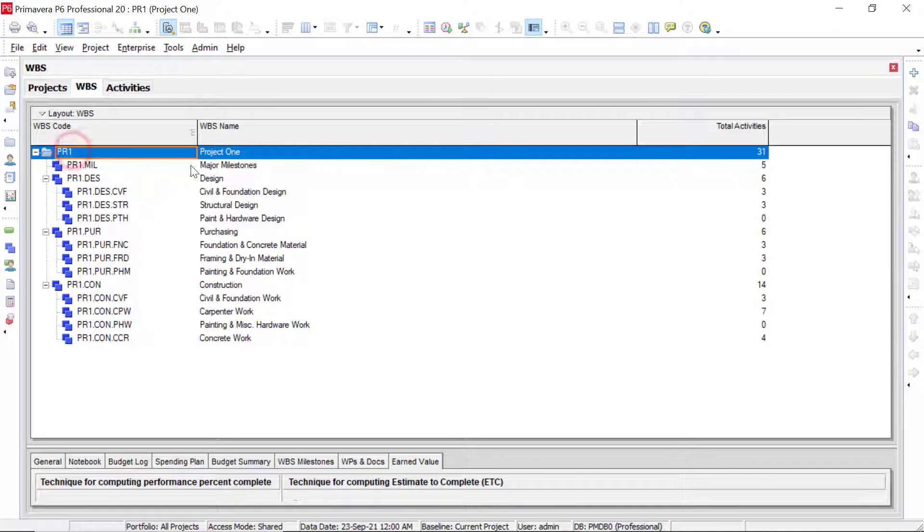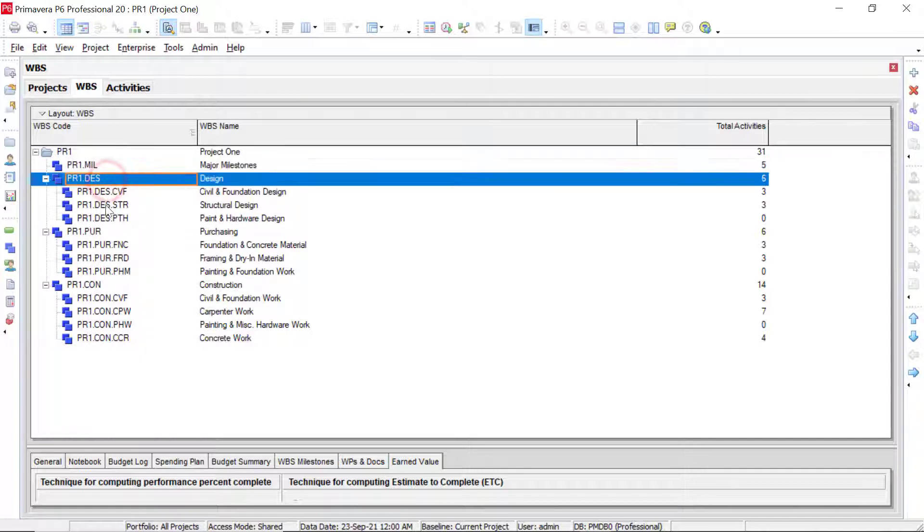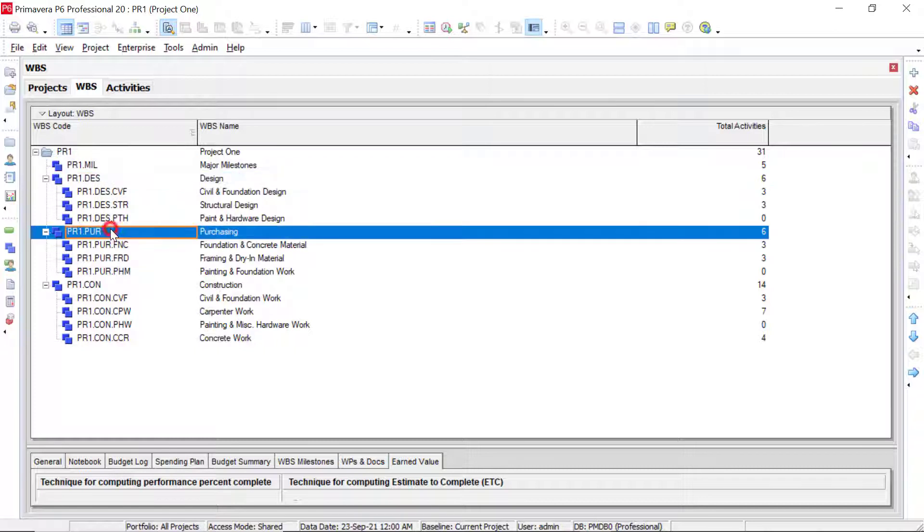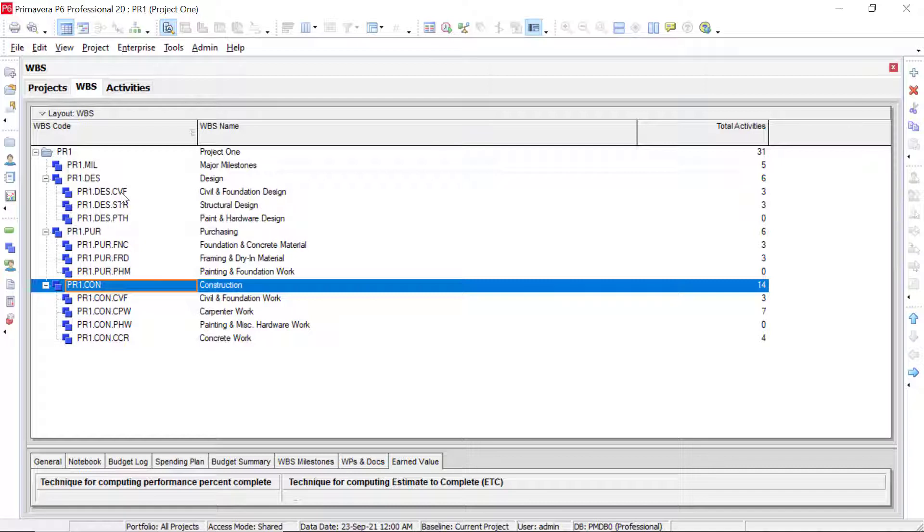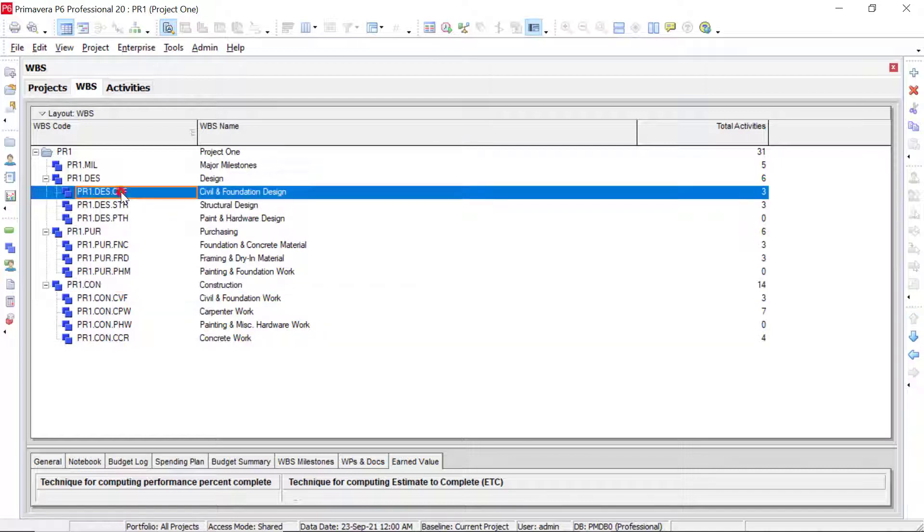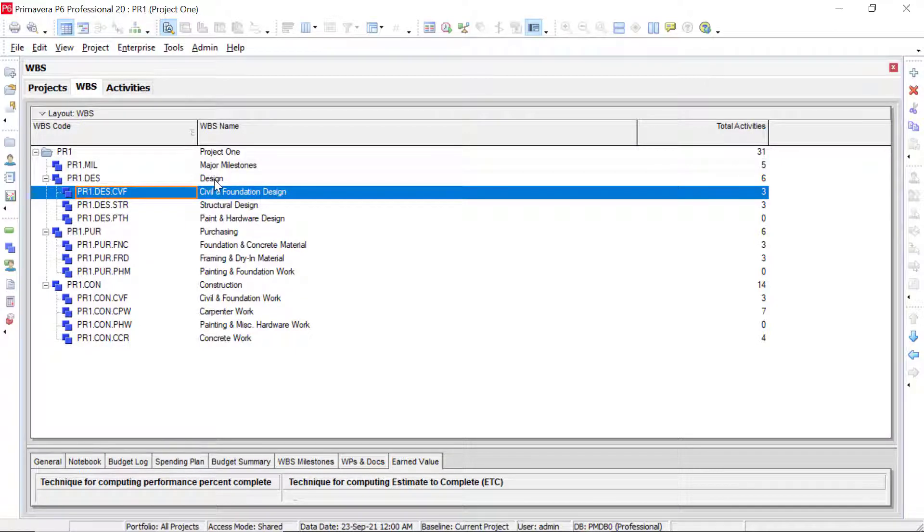So our number one WBS element that we have at the very top is always going to be the project that we're in. Underneath that, our second level of the WBS that we see here would be our major milestones. We have design, purchasing, and then construction. And then our third WBS elements that we have, our third level of elements, would fall under each one. So we have our civil and foundation design, which is underneath our design element right here.